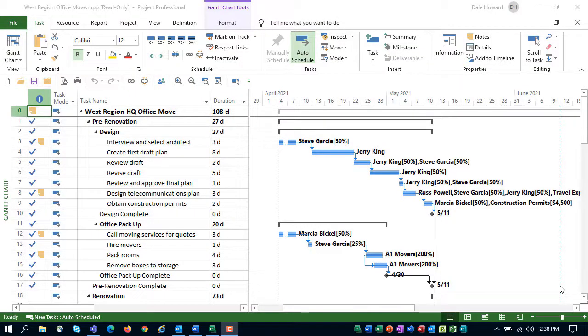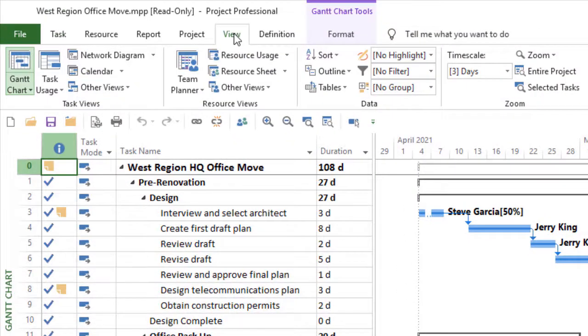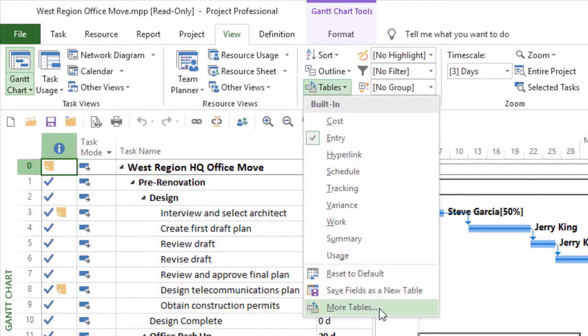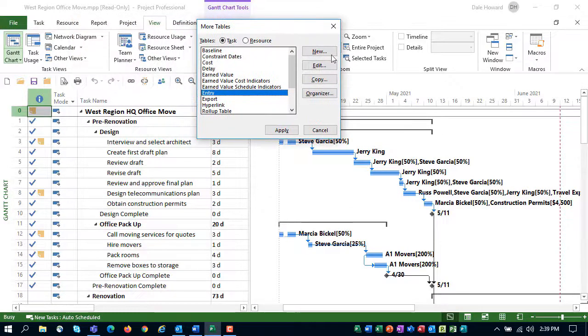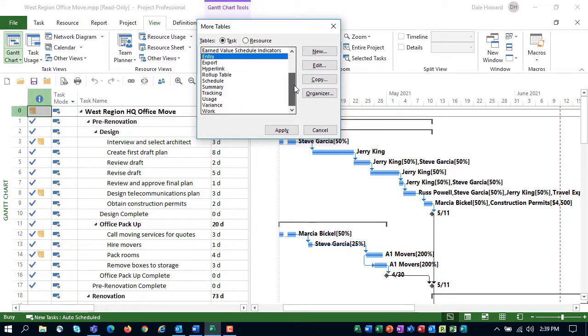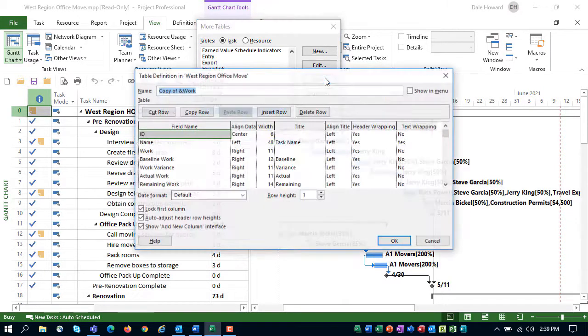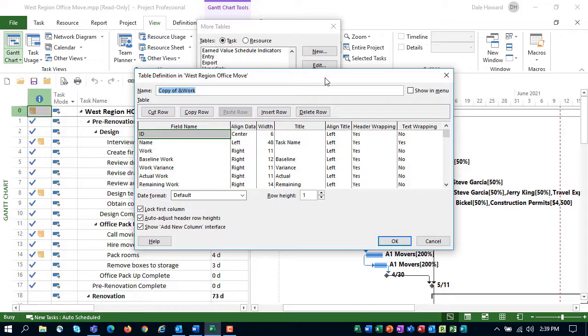To create the custom table, complete the following steps. Click the view tab to display the view ribbon, then click the tables pick list button, and select the more tables item. In the more tables dialog, scroll down and select the work table, and then click the copy button to make a copy of this table. We're copying the work table because the work columns are very closely related to the duration columns we need in our custom table.